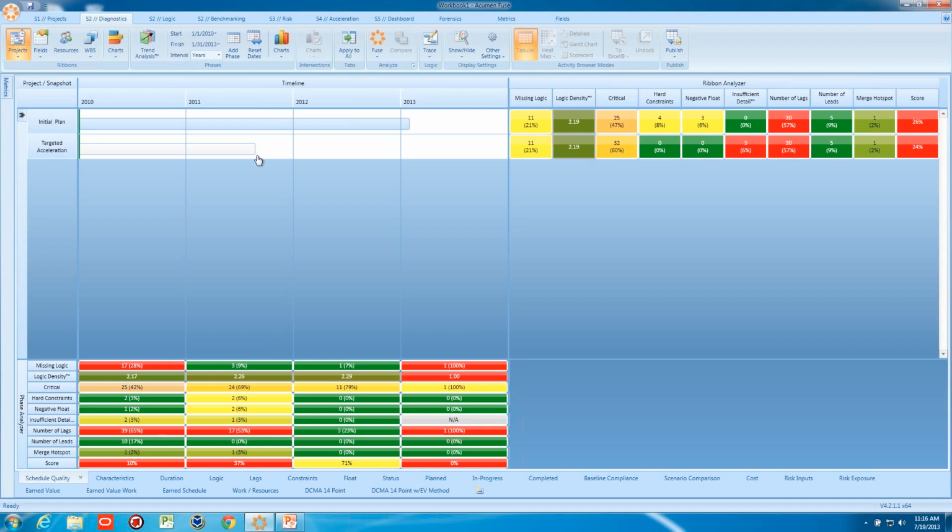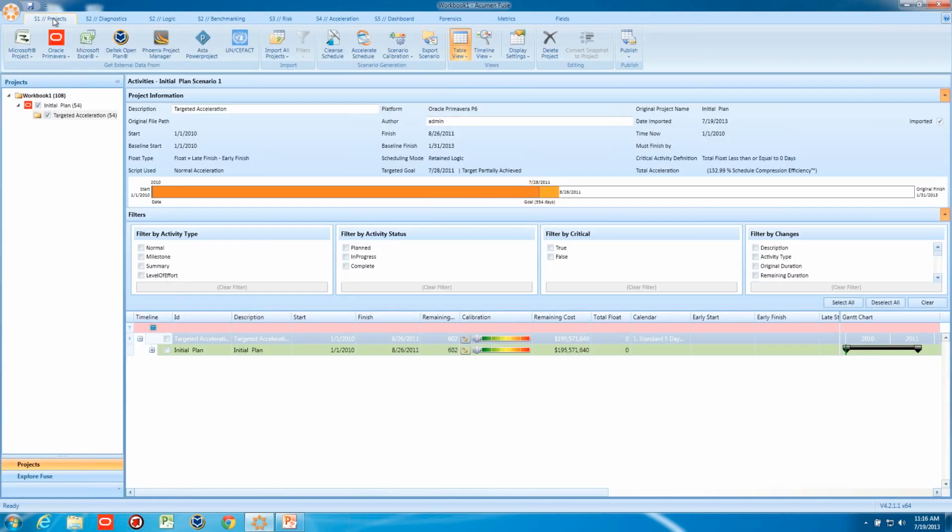And the system now believes some of our tasks have insufficient detail because many of the activity durations have stayed the same while the overall project has gotten shorter. Those durations now represent more than 10% of the project duration. At that point, when there's durations higher than 10% of project execution, we tend to feel that there's not enough detail in the project schedule. So that's something that you might wish to address if you do cut the time frame down on a project, is some of your durations might be really too large relative to the overall size of the project.